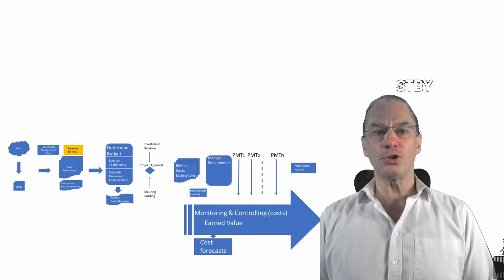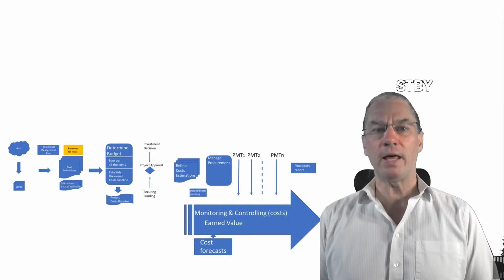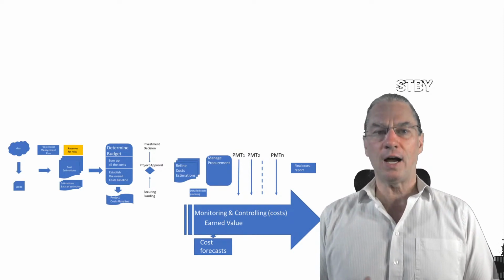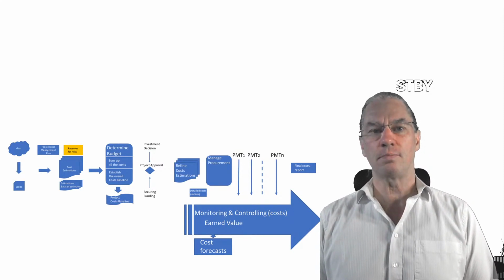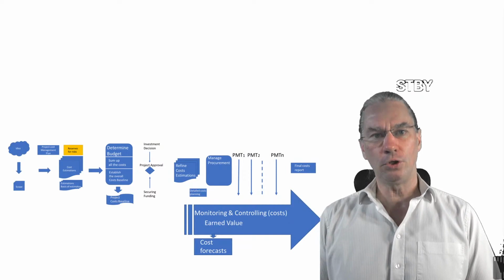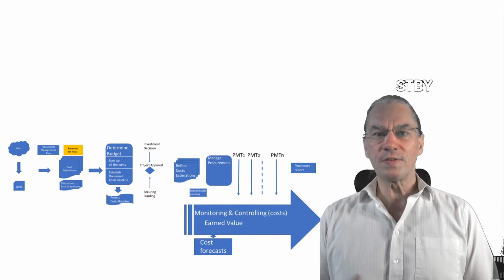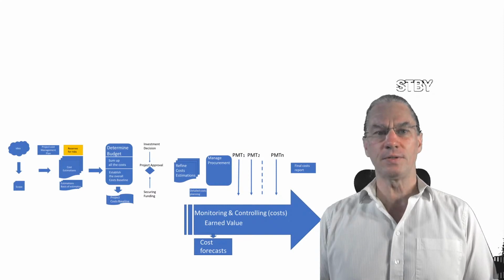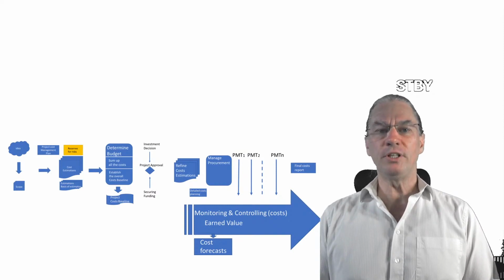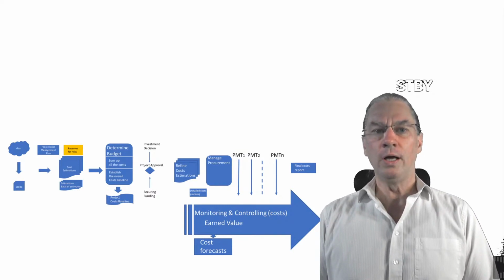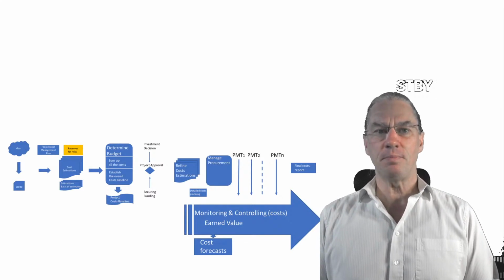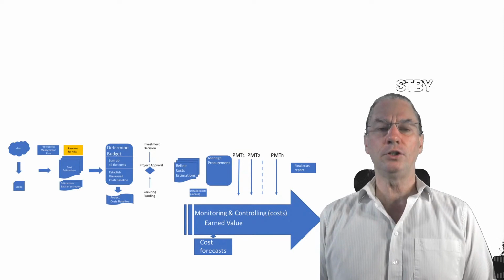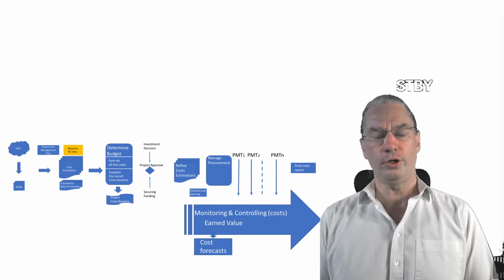And then comes a third video that will explain what kinds of estimation methods you can use. Once this is done, you have all the elements, and this will be defined in what we call the basis of estimates. It's a set of documents where you've done your estimation work.